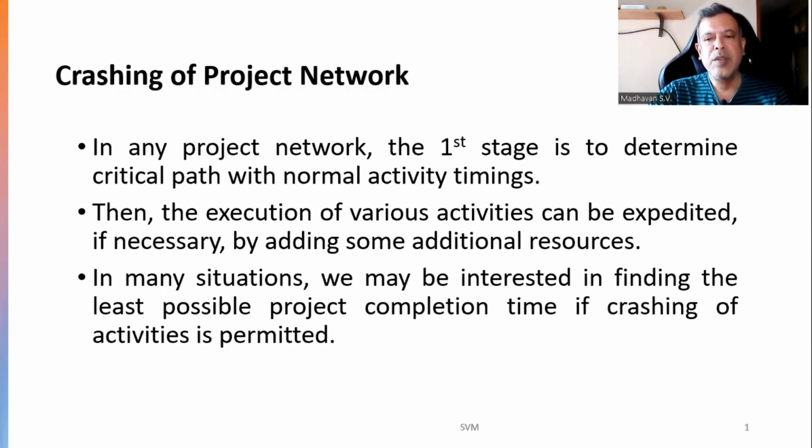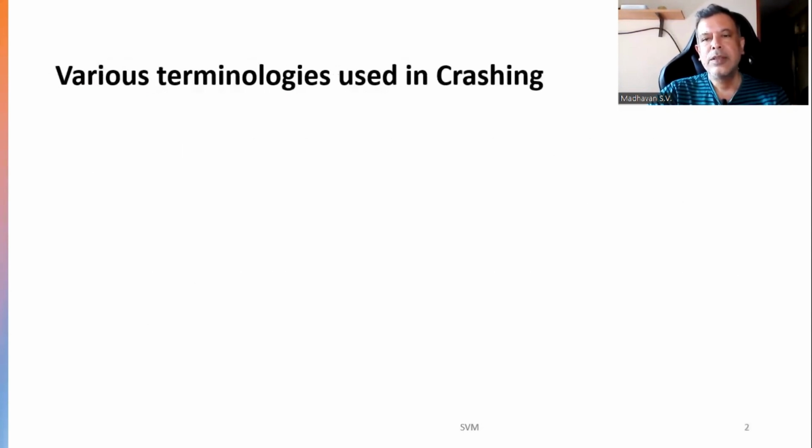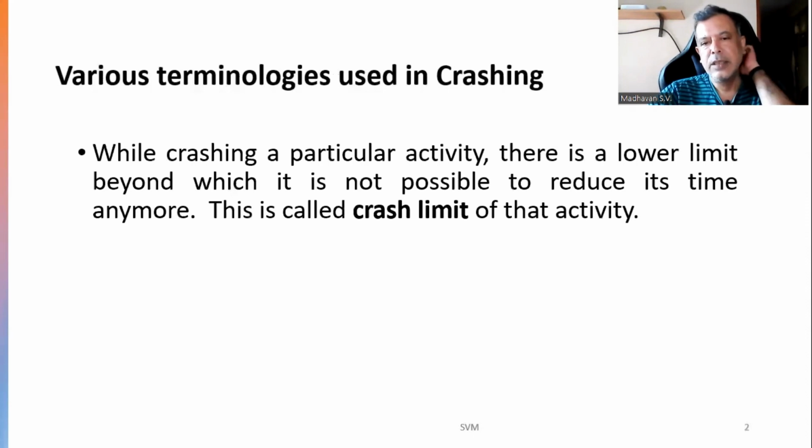In many situations, we may be interested in finding the least possible project completion time if crashing of activities is permitted. We'll now see the various terminologies used in crashing. First one is the crash limit. It is the difference between the normal time and the crash time.